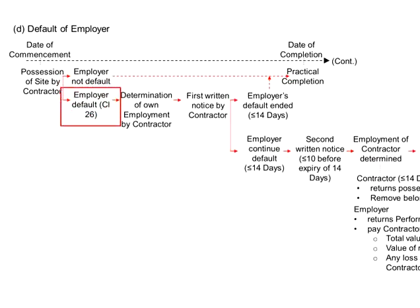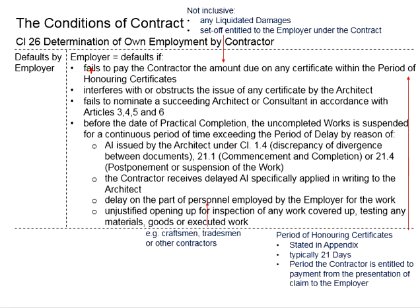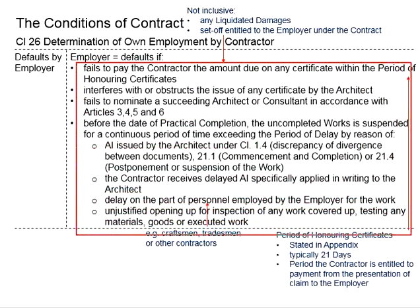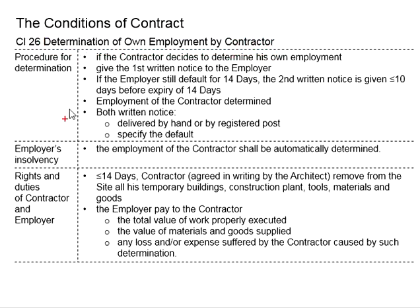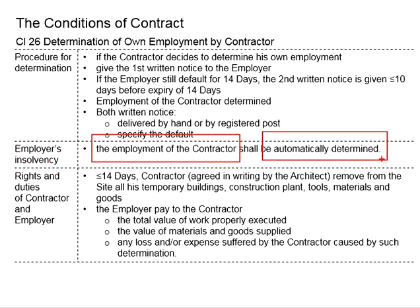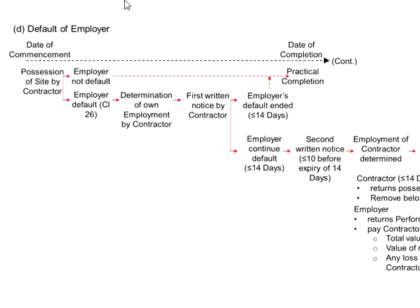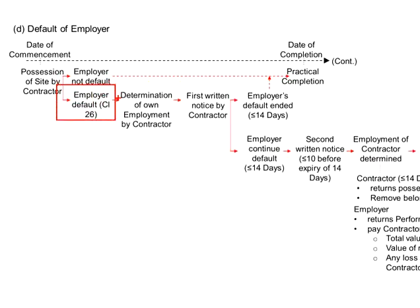In the case that the employer defaults — which can be any of the items listed here — or if the employer files for bankruptcy, then the determination of own employment by the contractor shall be triggered. If the employer files for bankruptcy, the employment of the contractor shall automatically be determined.